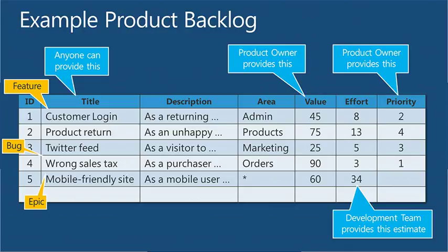Anyone can add to the product backlog, right? So the tooling has some security groups, but from a Scrum point of view, anyone can add anything they like to the product backlog. Product owner might decide it's flat last and it's about number 8,040, so you're never going to do it, but hey, we can all add to it, right? So we're going to put our suggestions on there. And then it might contain different types of work, so bugs, traditional feature requests. It might have epics, so I want something, for now I just want something really big. We'll chop it up later when we get to it, but for now let's just put something huge as a sort of almost a statement of intent, right? Something we'd like to do if we find that we have the capacity.